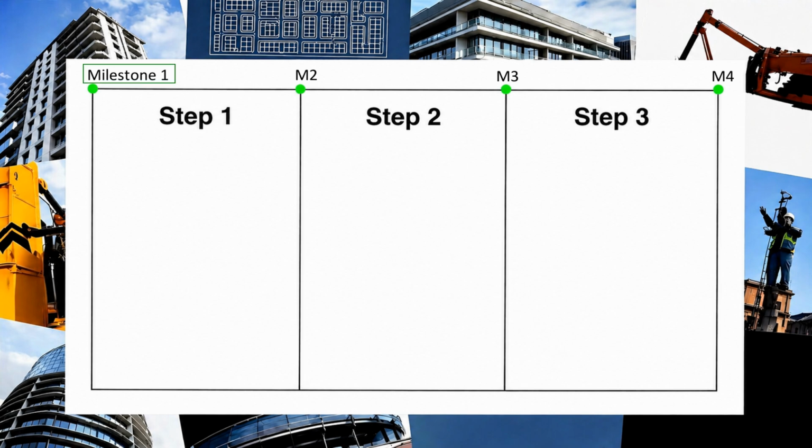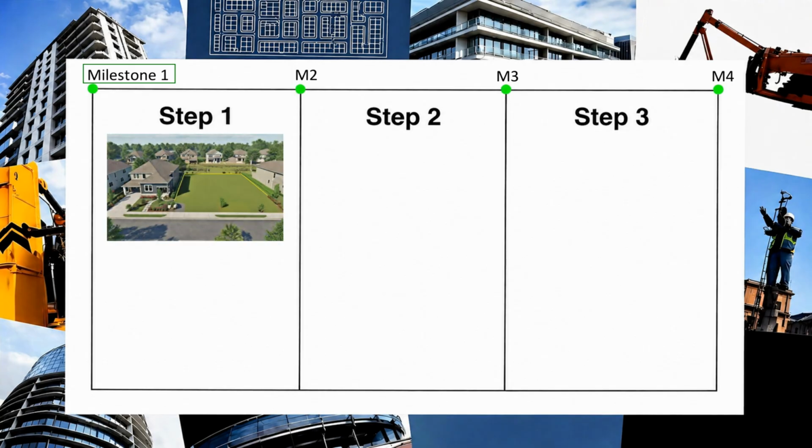Milestone 1 is the preliminary concept. It is assumed you already have screened and decided on a particular site. And keep in mind, step 1 is the most important for securing approvals prior to construction. For this example, we have bought a vacant parcel of land like this one here, and will develop an apartment complex on the site, which needs to undergo a code assessment and state government referral application to the Department of Transport and Main Roads. Step 1 involves local government planning constraints. Identify all relevant development codes, overlay codes, zone codes, and local plan codes that apply to the site. Adapt your design to comply with these assessment benchmarks.